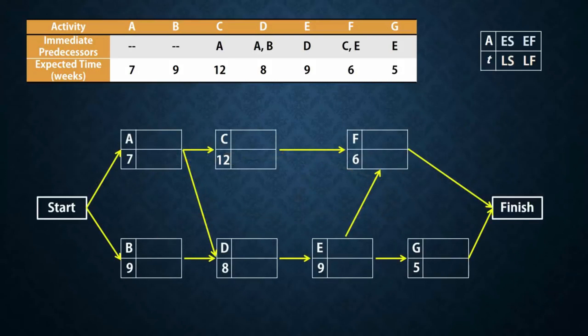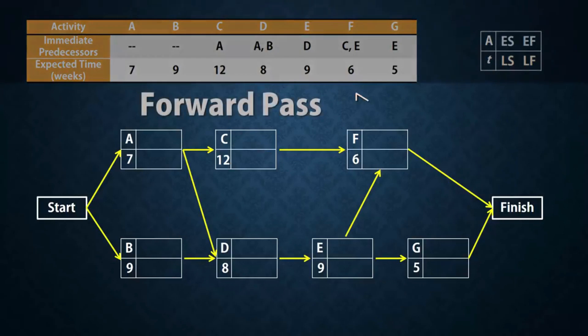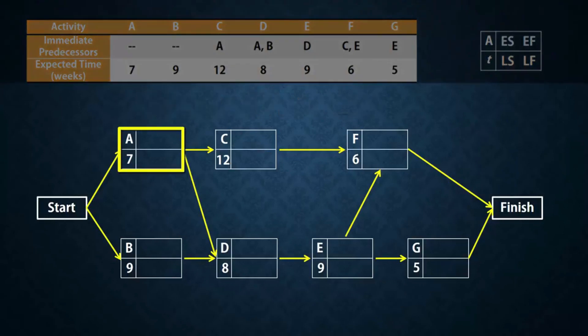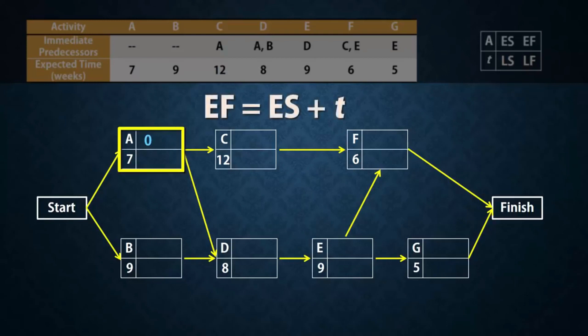Here is the network with the activity nodes displaying the letters and times. Let's do the forward pass. A has no predecessor so its earliest start time will be 0, or right away. Since it has 7 weeks to be completed, its earliest finish time will be 0 plus 7, which gives 7.